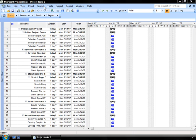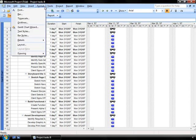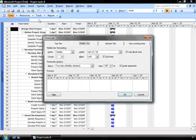I do that by going up to my Format menu and selecting the Timescale option.